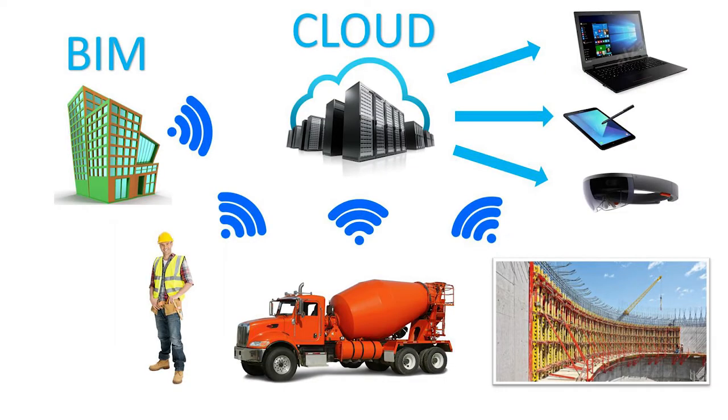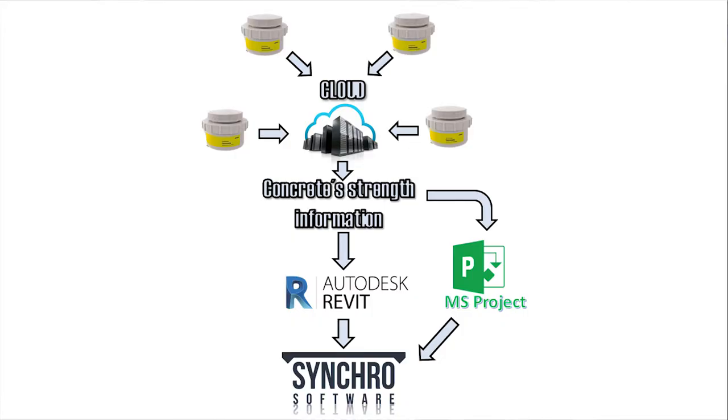We tested two main methods for this purpose. One method is based on adding information about real-time concrete strength into the 3D BIM model, and the second is based on modifying the time schedule.